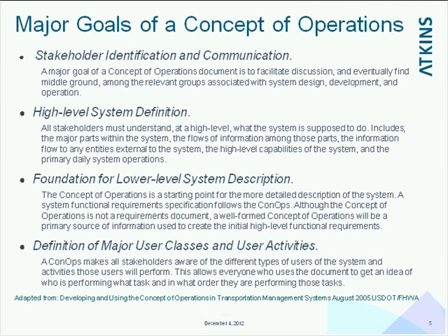The major goals of a concept of operations, and this is taken from another guide written in 2005 about transportation management systems. I think what's important is to first discover who your stakeholders are in the project, noting that they may not be who your client thinks they are, and they may not all share the same vision for the system. Further, stakeholders may not even know there are others who care about the system and have different views of it. So it's very important that you ask stakeholders, when you meet and talk with them, who they think would use the system or have an interest in the system.